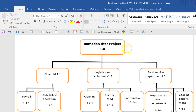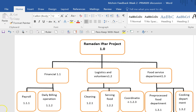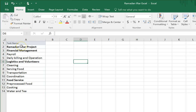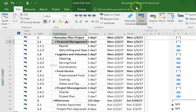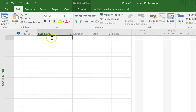All we need to do is go into Microsoft Project and enter these items in order, working from the top left to the bottom right. I've done this by simply putting them all in one column in Microsoft Excel, because all the Microsoft tools play well with each other. I can take everything I put in Excel, top to bottom, and take that over to a brand new Microsoft Project sheet and paste it in.